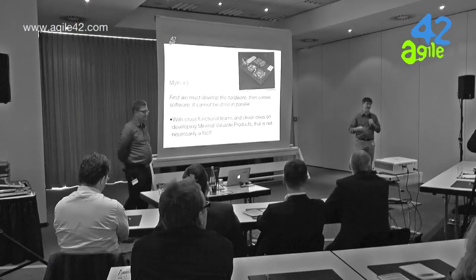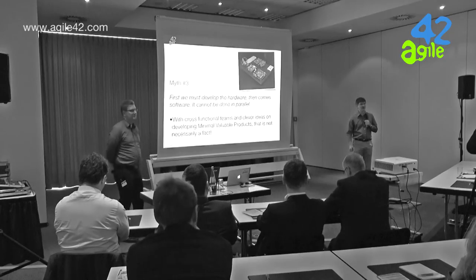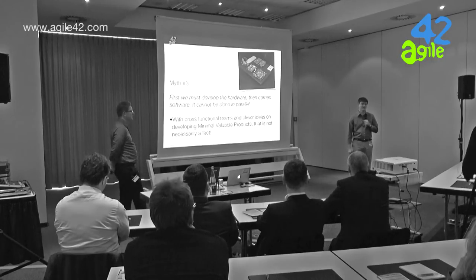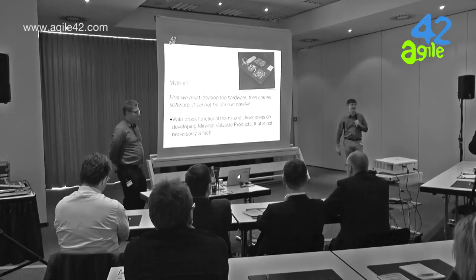And then you start reducing that 4 square meter size to smaller and smaller form factors, until you start challenging the electronics and the thermal design, which is a big issue, especially with high-performing hardware. And when you work with fiber optics, every wrong turn is reducing the efficiency of the fibers. So you have to be very careful on how you actually bend the plastic cable. And that is where a lot of 3D printing also helped, to see how you can actually make the cable go through that board, because we are talking about a lot of fibers moving in there. So, minimum viable product, think out of the box. Don't think about the final product from the first day, but start validating assumptions and options from the beginning.